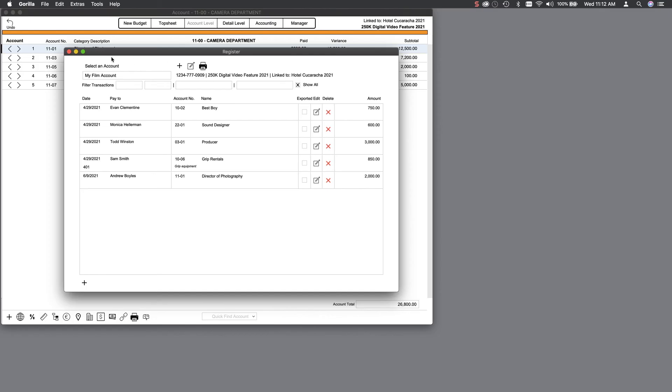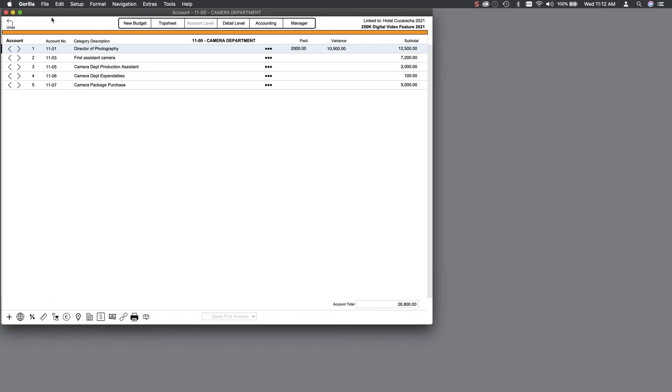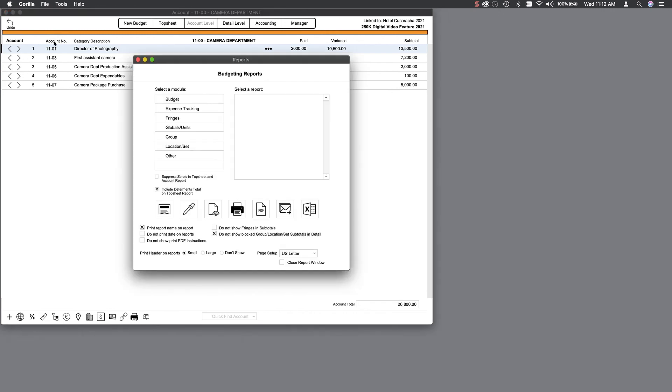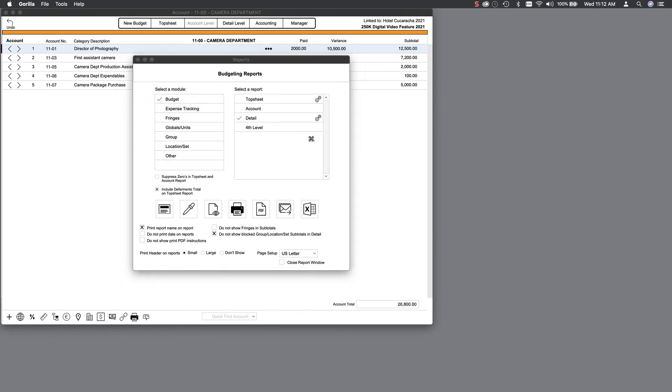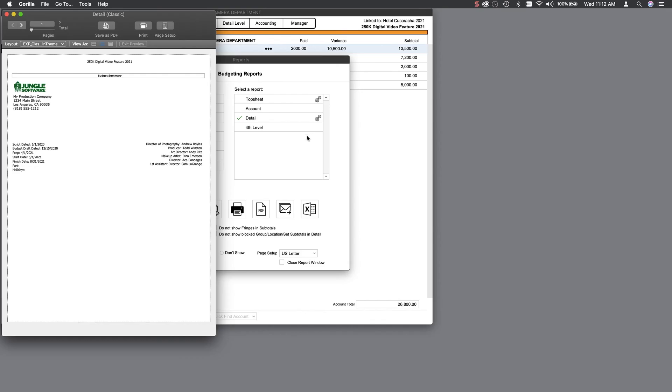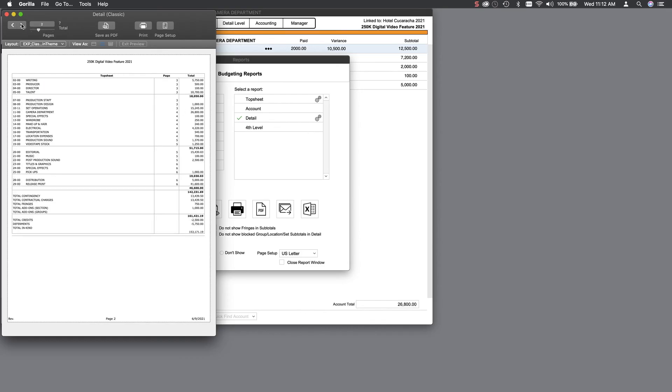At the end of the day, you can export all your transactions or run a balance report showing you the variance of all your totals. And speaking of reports, Gorilla can print your top sheet and detail summary. Select the Budget module on the left and then the budget report desired on the right. The detail report offers both a standard detail-only report or a classic detail report, which includes the top sheet and summary.